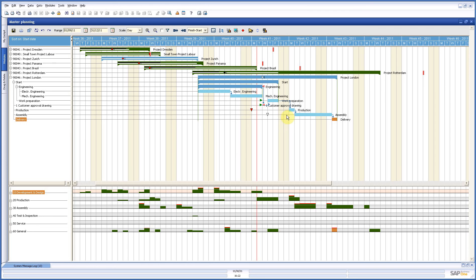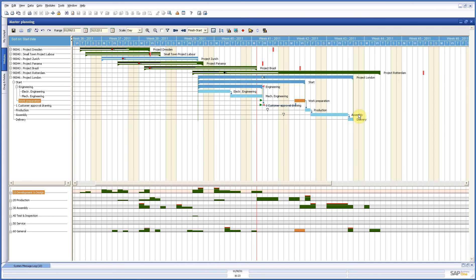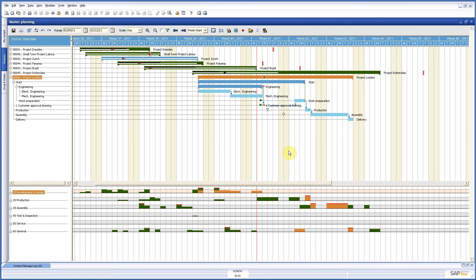If I put this one and put it to the right, then only everything underneath here is going to the right, because these constraints are valid. So, you can move and manipulate your planning very, very easily.